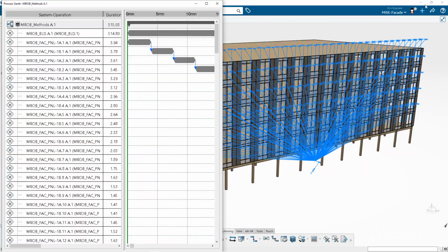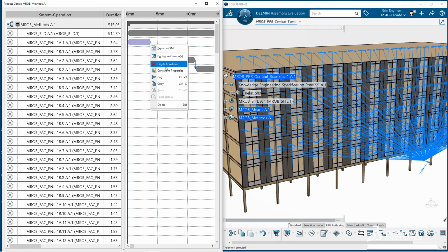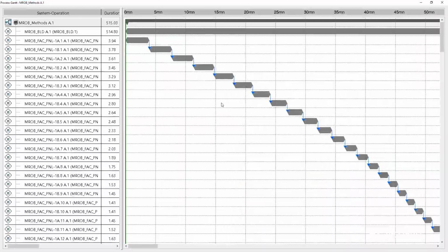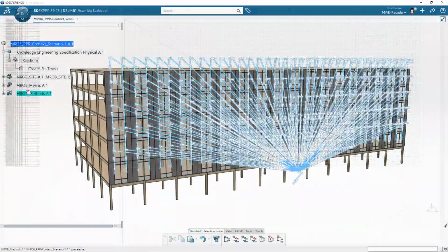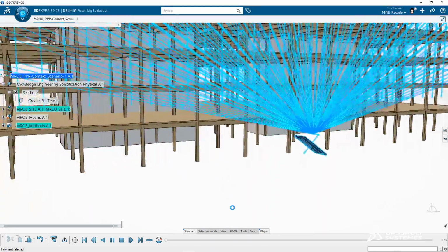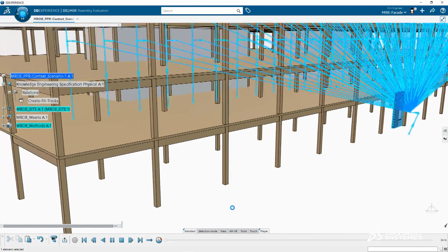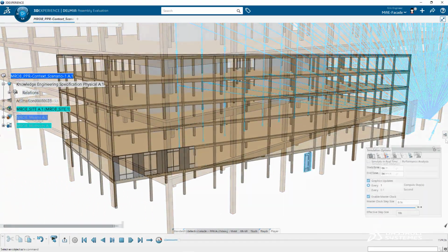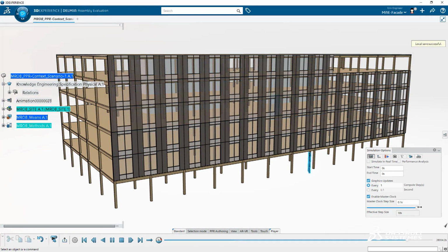Now we can look at each of these tracks in the Gantt view and see the duration of each of them, how they're constrained and how they vary as the lifting distances vary. They can play the whole scenario back at normal speed or sped up and examine the entire scenario as it would play out.